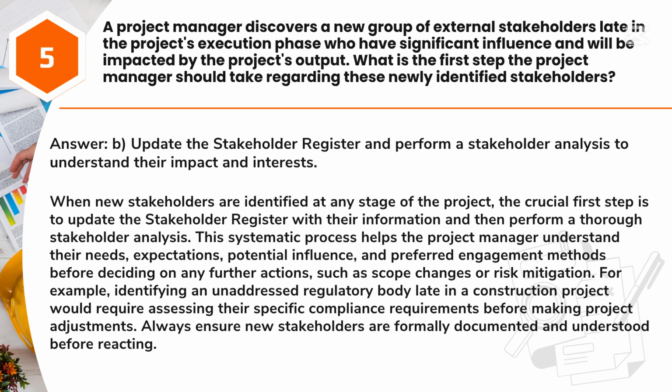Answer: B. Update the stakeholder register and perform a stakeholder analysis to understand their impact and interests. When new stakeholders are identified at any stage of the project, the crucial first step is to update the stakeholder register with their information and then perform a thorough stakeholder analysis. This systematic process helps the project manager understand their needs, expectations, potential influence, and preferred engagement methods before deciding on any further actions, such as scope changes or risk mitigation.